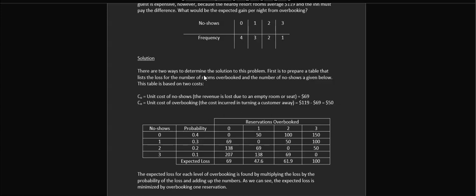So what you do is you go down the line here and you put the 100K for risk 1, 100K for risk 2, 100K for risk 3, 100K for risk 4, and what's the probability of that risk occurring? And say it's the same thing here, 0.40, 0.30, 0.20, 0.10. It doesn't have to total 1.0 because risks can all occur. I wouldn't put a 1.0 because that means you know it's going to occur, so you're going to fund it.